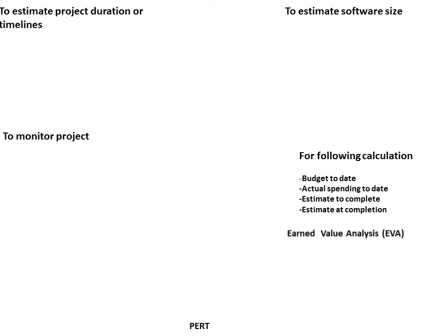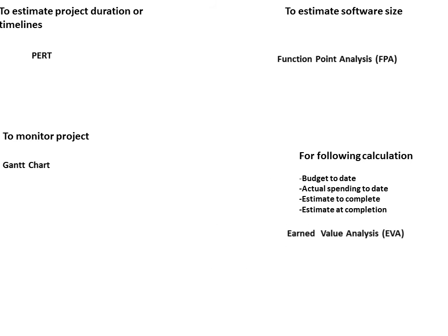PERT is used to estimate project duration or timelines. Gantt Chart is used to monitor the project. Function Point Analysis is used to estimate software size. CPM is also used to estimate project duration or timeline, but first preference is given to PERT. Similarly, SLOC is used to estimate software size, but first preference is given to Function Point Analysis.